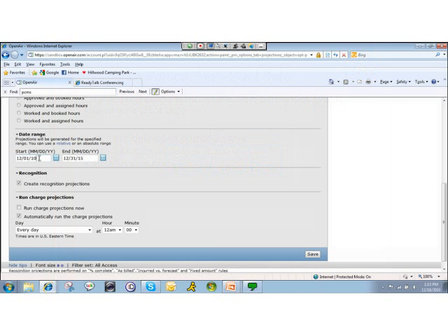Typically that's done when there's some kind of month-end process in the system, and anything before this date is an actual in the system. There's actual billing, actual revenue, actual time, and there's no need to forecast in history if there are actuals in history. But you want to forecast because, for example, this month of December, if you're a monthly billing company, the forecast as of December 1st going forward means that as you're working in the month of December, you're watching to see how the forecast is changing and impacting based on work completed, and understanding if you're going to be able to hit your goals in the forecast.